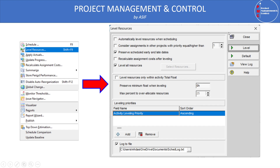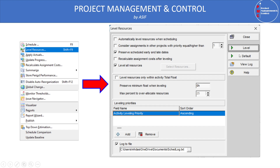In the Level Resources dialog box, there are several options. 'Automatically level resources when scheduling' is not recommended since our programs are normally time-constrained. 'Consider assignments in other projects with priority equal or higher' is also not recommended because construction projects are typically standalone with no shared resources. 'Preserve schedule early and late dates' comes by default. 'Recalculate assignment costs after leveling' is also not recommended for time-constrained projects.